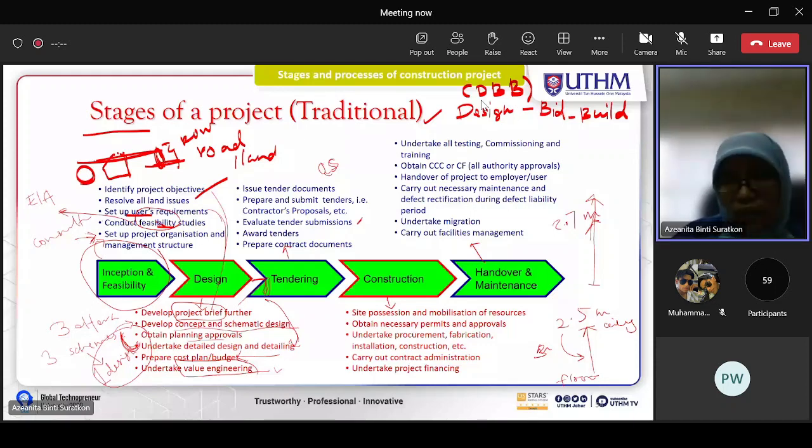So out of 11, from the QS analysis, he will suggest to the board of tender, for example, 3 best contractors for consideration. And then the board of tender will have a meeting and decide on 1 best contractor.